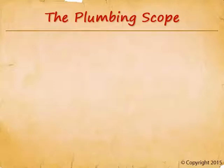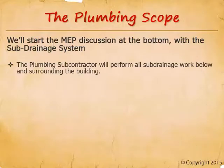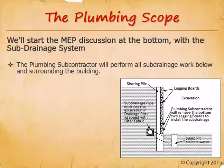Now we'll move into the most technical trades: mechanical, electrical, plumbing, and fire sprinkler. Starting with the sub-drainage system at the bottom of the building: the plumbing subcontractor completes all sub-drainage work below and immediately adjacent to the building — typically a 4-inch perforated pipe in a 12-inch by 12-inch bed of drain rock surrounded by filter fabric. Sub-drains are within 5 feet of the building, so they belong to the plumbing sub, not the site utility subcontractor, as is sometimes mistaken.